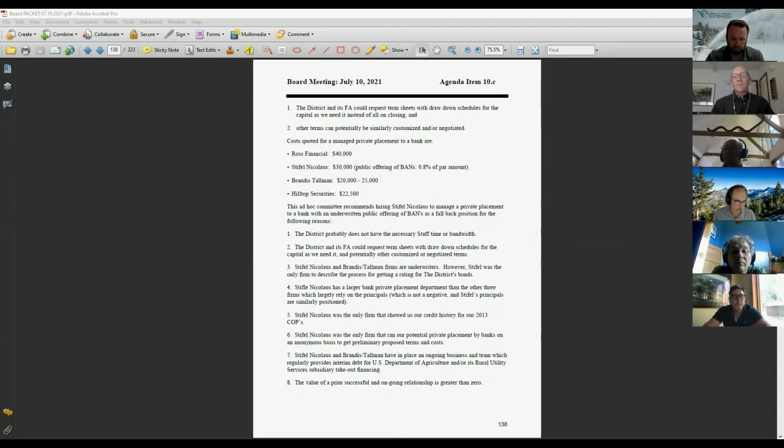The long-term financing for the wastewater treatment plant refurbishing will be through an RUS loan, and that's been applied for and approvals anticipated in September of this year. But RUS won't provide those funds until the project is completed, and the project's expected to go for at least 3 years. And so we need to secure commercial financing to cover that 3 to 4 year period. And then that will be paid back with the proceeds of the RUS loan.